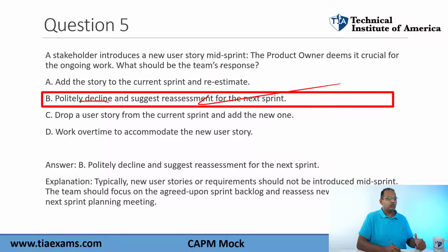Now, add the story to the current sprint? No, do not change the work. Once a sprint starts, it should not change. Drop a user story from the current sprint? Don't change. This one is also changing the current sprint.